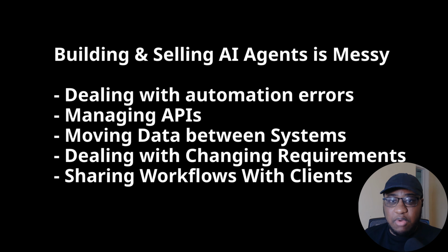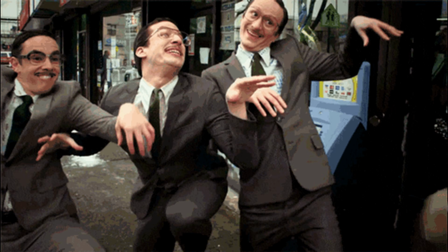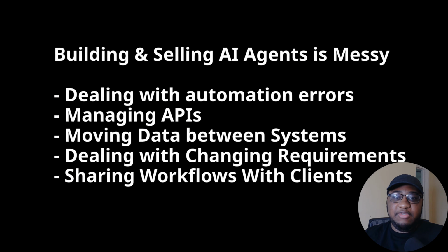And dealing with changing requirements. This is one, it's called scope creep if you haven't ever dealt with this, but it usually starts off you have a project and there's a set of functionality or features or things you need to build. But then as you get into the project, reality hits and things change, requirements change. And of course, you might have a process to go through the change with your client and the change inside of your project. But at the end of the day, when it comes to your actual architecture, your system that you're building, it does not accommodate change really well. If you've built it in a certain way, it can be really difficult to pivot and change direction without having to throw the entire thing out.